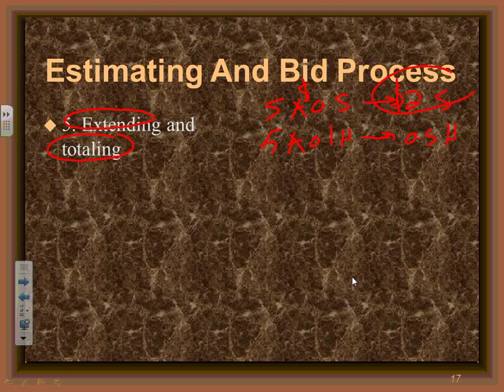And then totaling, if you say multiply this one by, say, 100 hours, and then add them up. So then you add, what did we say here? 2.5 plus 50, it's $52.5. So you add them up, do the math. Any comments, guys? Any questions about extending and totaling, doing the math? So you take 5 boxes, each one of them $0.5, multiply them by 5, 2.5. 5 boxes, each one of them to install needs 0.1 of an hour. You multiply the 5 by 0.1, gives you 0.5. And then assign labors to them and total them.